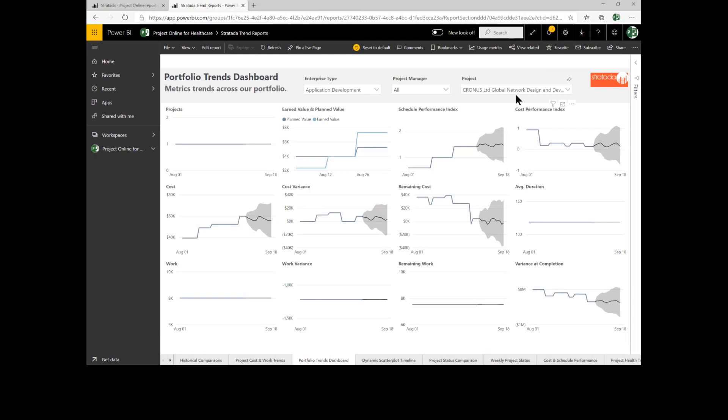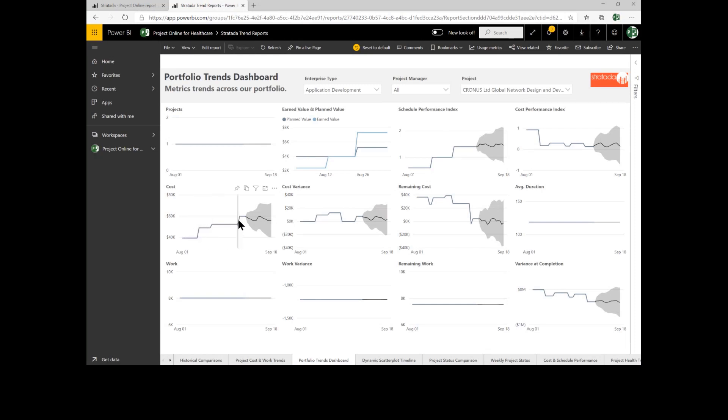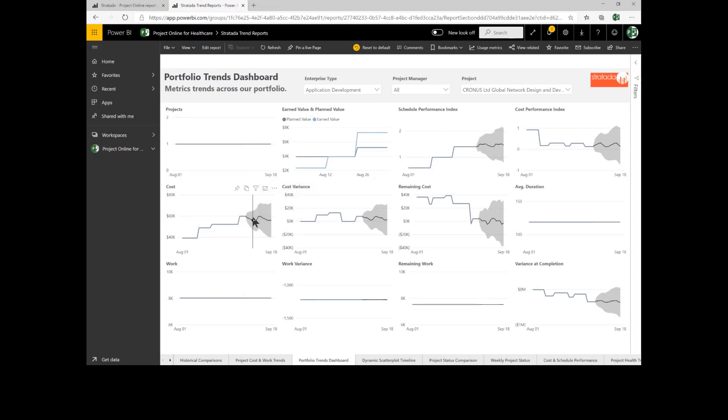What Stratata gives us the ability to do with its timeline intelligence is actually forecast based on AI. I can see in this case how cost has changed and here we've come up to today's date. And what the cone is showing us is what is likely to occur from an upper bound and a lower bound based on a statistical AI forecast.